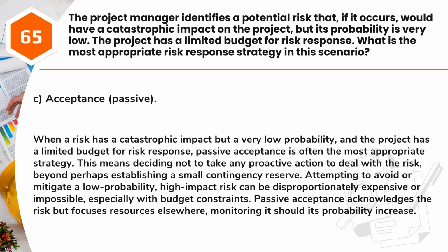Attempting to avoid or mitigate a low probability, high-impact risk can be disproportionately expensive or impossible, especially with budget constraints. Passive acceptance acknowledges the risk but focuses resources elsewhere, monitoring it should its probability increase.